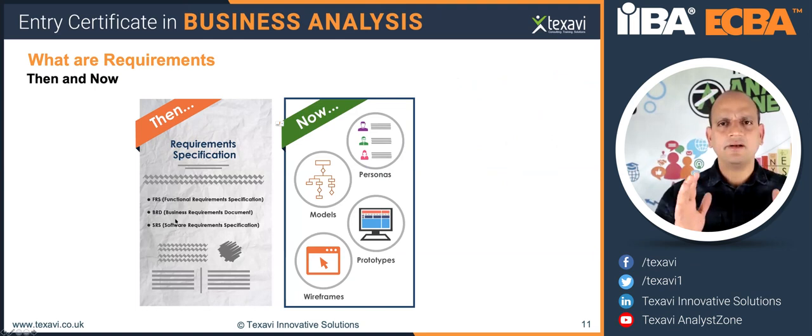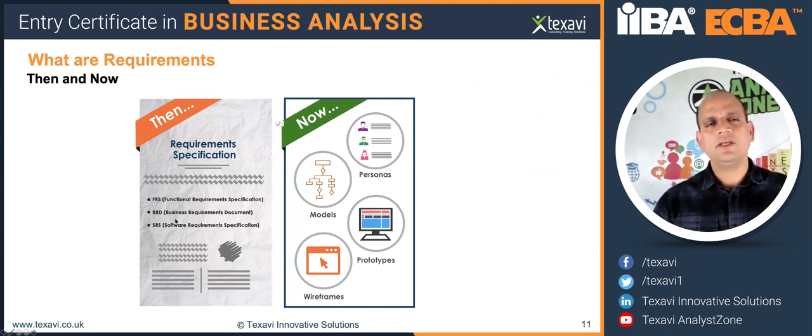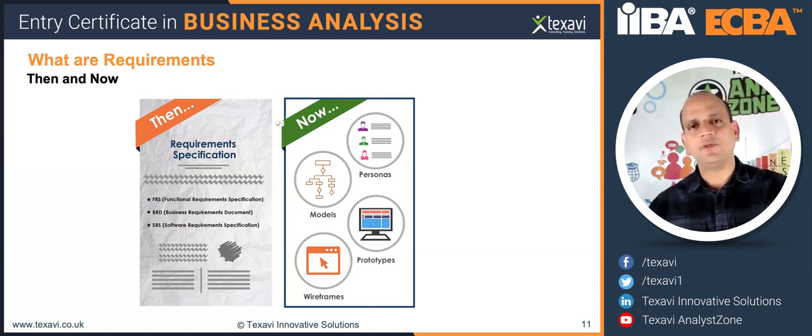When 500, 600, 1,000 pages of documents used to be the guiding factors for how the project would shape up. We used to spend a good 4-5 months to write up the requirements, to do meetings with the stakeholders, come back and write the requirements, get their approval. Once they're signed off, the frozen requirements would form the basis for the next step, which is architecture and all that.